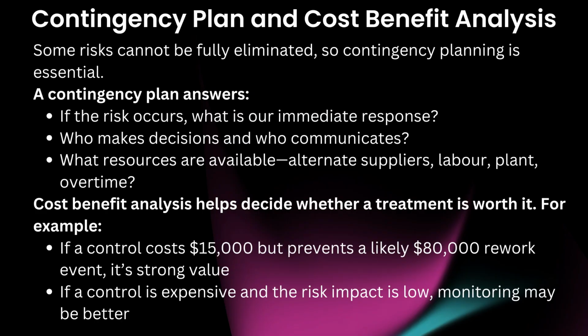Contingency plan and cost-benefit analysis. Some risks cannot be fully eliminated, so contingency planning is essential. A contingency plan answers: if the risk occurs, what is our immediate response? Who makes decisions and who communicates? What resources are available: alternate suppliers, labour, plant over time?